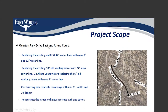On Overton Park Drive East and Altura Court, we are replacing the existing old 8-inch and 12-inch waterlines with new 8-inch and 12-inch waterlines. On Altura Court, we are replacing the old 6-inch waterline with a new 8-inch waterline. We are also going to construct new concrete driveways with a minimum 11-foot width and 10-foot length. At the end, both streets will get new pavement with new concrete curb and gutter.